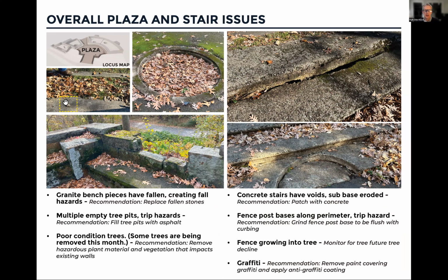So there are still some of those fence posts that are a tripping hazard, where there used to be tree pits. Those could be filled in to prevent a tripping hazard. Some of the stone walls that form the backs of the benches have fallen apart, and they could be rebuilt to stabilize the structure. We can patch the holes in the stairs, and where there used to be trees within the stairs, we can make that so it's not a tripping hazard.